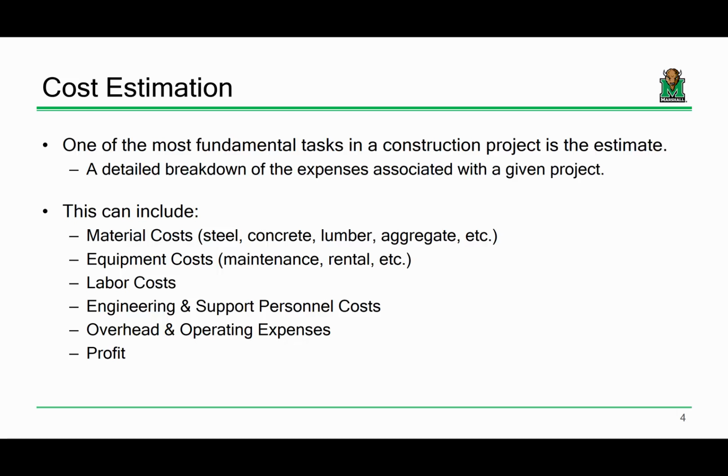So I don't want you to think that just the dollar figure at the end of the day is the be-all, end-all final decision maker. It isn't, but it's a big one. If I have two options and one costs $300,000 at the end of the day and one costs $500,000, and every other conceivable parameter, transportation, transporting girders, labor requirements, everything else is identical, I'm going to go with the cheaper project. So I want you to understand how this works. Now, when I say cost estimation, I'm talking about more than just raw material costs, like the cost of the structural steel, the cost of the concrete.